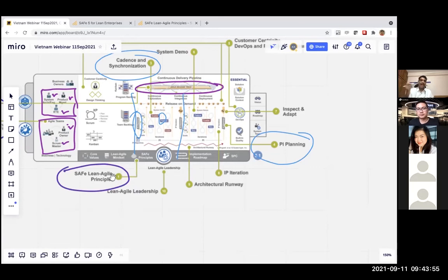The idea is if you have a doubt, you just walk across the room in the real world. In a virtual world, you walk across to a different meeting, maybe, right? So you have separate meetings, breakout rooms for separate teams. You walk out there and talk to each other, solve the issues and come back. So the PA planning is a 2-day event, which helps you to set your train into motion. In the sense, I'm going to start my train and then move forward, right?